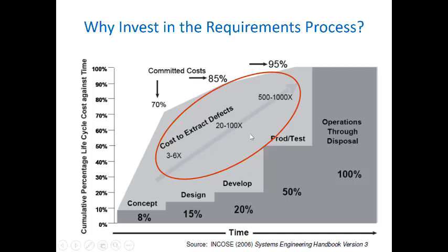But as we go through the end of the design, as we go through production and test and utilization, if we see the need for change because we have not paid much attention to the requirement of customers, then the cost of implementing those changes would be much higher as opposed to what we may face early in the life cycle of the project. And again, this graph emphasizes the importance of the design phase in the life cycle of the project and the decisions that are made in this phase.